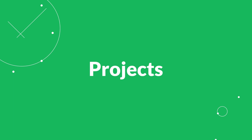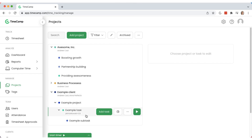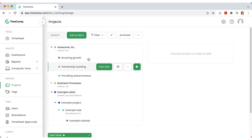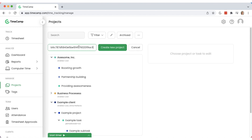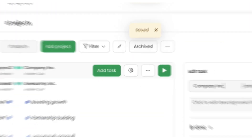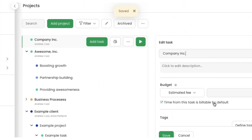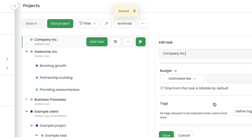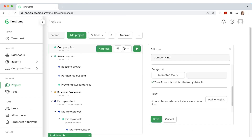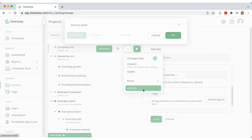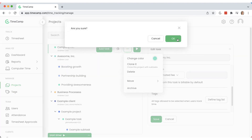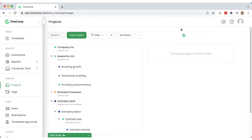TimeCamp has a unique project structure for more efficient time categorization. You can create a project and add as many tasks and subtasks as you wish to break down user activity and log time for each of them. You can also archive projects and tasks that are no longer in use.